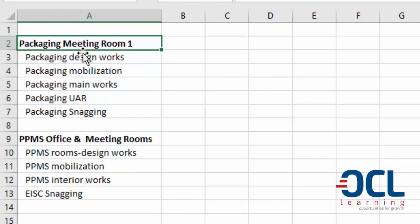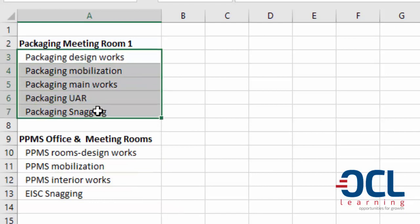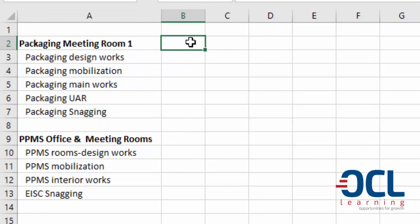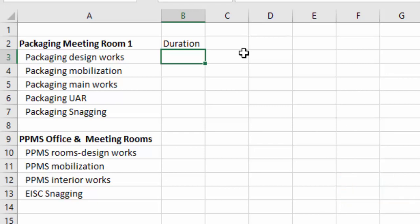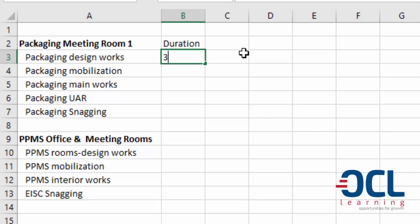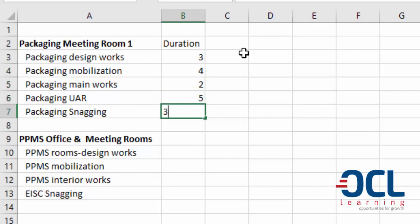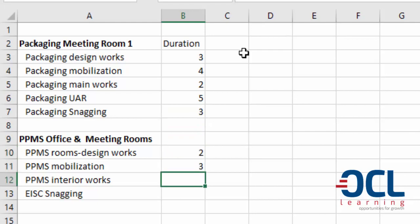This is the main task and the subtask. Then we'll enter the duration of each task. We are going to use the project management code for finish-to-start. I'm going to assume this takes three days, four days, two days, five days, three days, then two days, three days, one day.